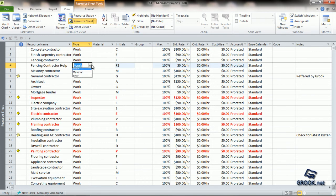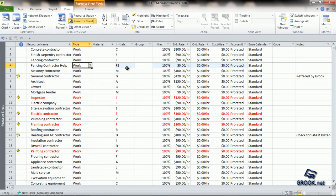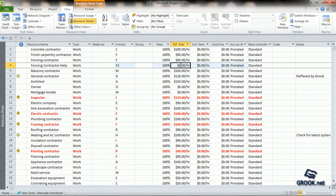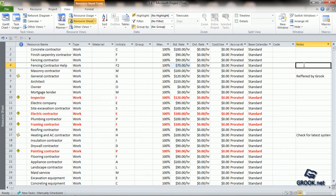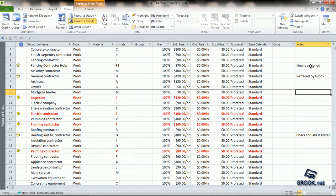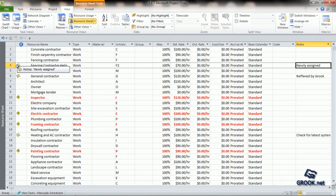From here, we can change the type and show it as Work, Material, or Cost. Since ours is a work resource, we can click on Work. The initials we had set appear here. We can set his maximum units depending on how much we want him to work — let us leave this newly added resource at 100% assignment units. We can enter his standard rate for work, let us say 70, and add any overtime rate if needed. Any notes we want to enter, such as 'newly assigned', can be added here. The note indicator also becomes active.